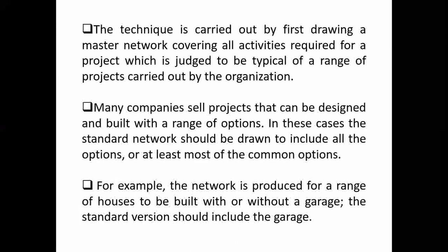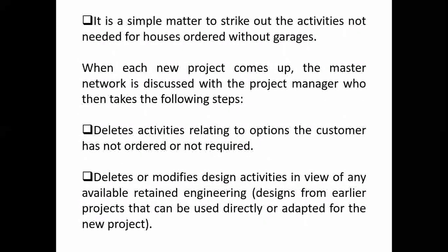The standard version should include a garage. So that if you don't want to include the garage, just remove that part that you don't want. If there will be a need of including a garage, then take the whole standard network the way it is and adopt it as a new project plan. Have you seen the beauty of having such network diagrams which are kept for future reference? These are the benefits. You save time and also cost. So people, it is a simple matter to strike out the activity not needed for the house product and routing.